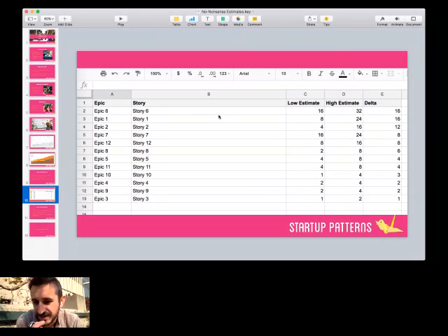And then the team can drill down into the architecture and drill down into the process to try to discover, well, maybe there are some things we can surface here. And we would redo the estimates after that discussion. Maybe you focus on just the top half of the list and try to get those low and high estimates tighter based on further discussion and further investigation.